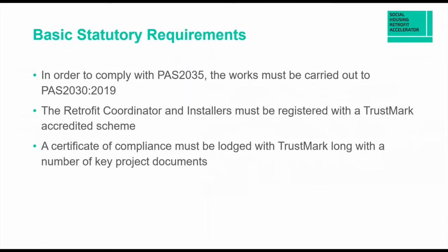So these two are designed to work in coordination with one another. The retrofit coordinators and installers need to be registered with a Trustmark accredited scheme. So this gives a bit of a dispute resolution process, a complaints process, a structure to how they need to handle complaints, how they need to handle any kind of non-performance or inability to meet intended outcomes, and it gives some structure around basically protecting the householder.